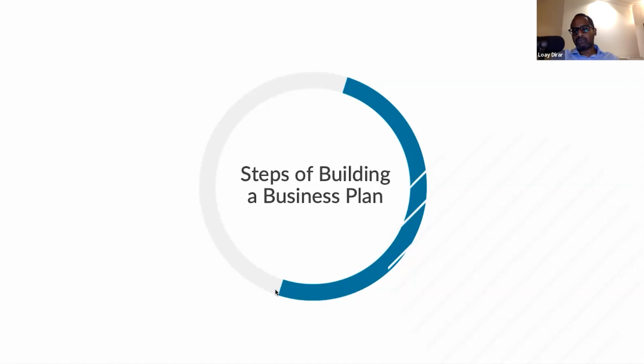Mohammed asks a question: are calculations of needed capital done in business planning? Yes, you need to know exactly how much capital you need in order to develop a business plan. You need to consider the fixed assets, which we call CAPEX, the capital expenditure, and the operational budget, which we call OPEX. Plus, you need to consider whether you're going to pay taxes in the early years, and to set aside what we call a contingency budget. So these are the factors: you need the CAPEX, you need the OPEX, and you need to consider taxes and a contingency budget.